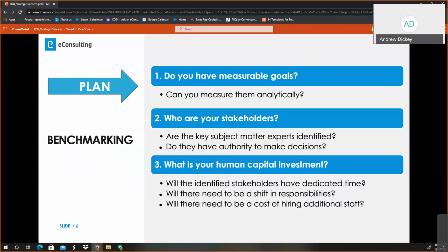So as we go through planning the whole project in the very beginning, they may say they want the project to take place in 12 weeks, but it actually is going to take us more like 24 weeks due to the time requirements. Will we need to bring in additional staff? Due to responsibilities and changes in the company, people working virtually right now, or we're going to do some managed services to bring other staff in. So we want to do this very early on in the planning phase before we ever start the projects. Let's get it on paper, let's publish it, and let's get executive and all key stakeholders to agree upon it. And then at that point, we begin the project.